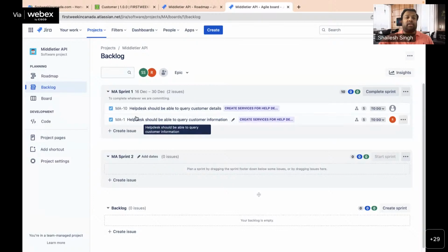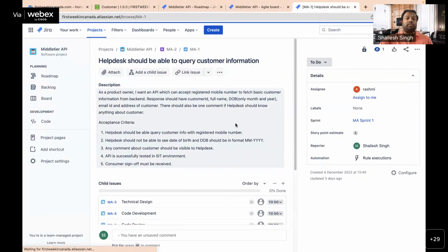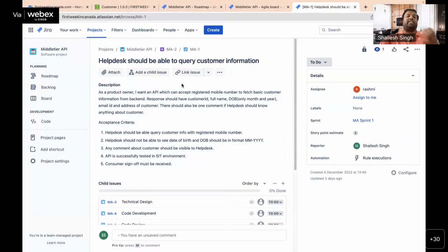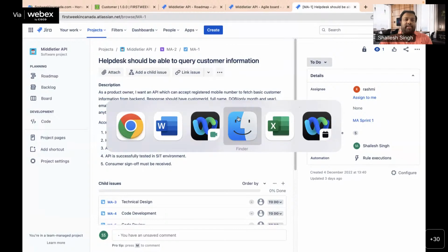So we opened one user story and we discussed about it, right? The entire Scrum team discussed about it, okay? And then the Scrum Master asked, okay, how much effort you think will be needed for this? And then everyone played a game, planning poker. You remember? I told you how to play the planning poker. At the same time, the entire team pinged the Scrum Master through some mechanism, okay? Through WebEx, through team chat, or through any external app, right? And then, so last class I told you how it happens.